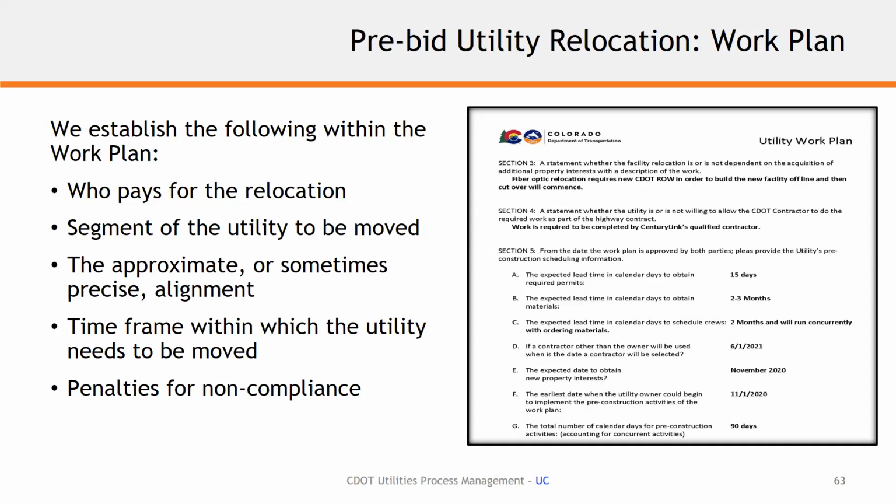So yeah, managing this handoff, especially the work plan that's been developed into a final spec, is monitored during construction. And this slide here articulates that. It's like, well, we know who's paying for the relocation. If it's utility company or CDOT, it's fine. What segment of the utility is to be moved? What's the alignment and where is it going to be? That's all hashed out and should be known by now.